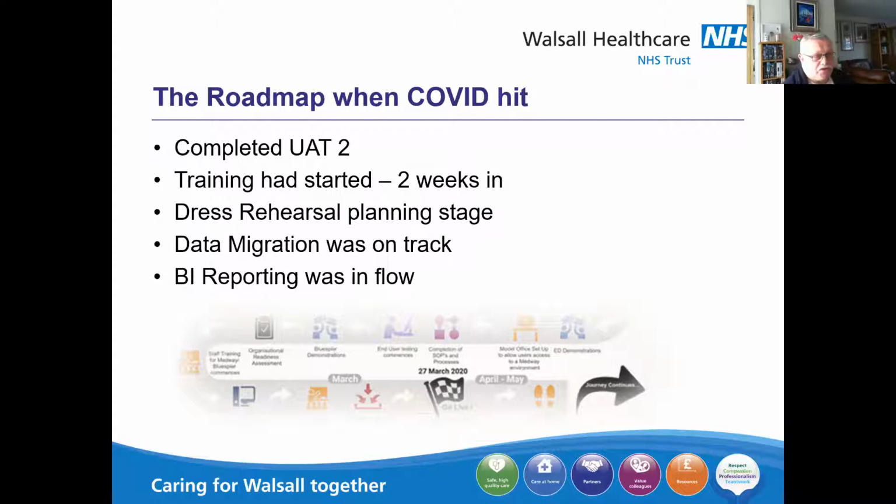Thank you, Keith. So as you saw on the previous slide, our original plan is just going up in flames. But where were we at that stage? We had just completed UAT2. We commenced training, we were 2 weeks in. We started on our dress rehearsal planning stage to get everything ready. Our data migration was on track, and our BI reporting was in flow. Now, as Barnsley had explained when they were going through it, everything completely changed. We did a complete stop of every single piece of work that we were doing on the EPR programme, and then moved on to COVID. And our training team and everything was then completely caught up with everything other than the EPR. So next slide, please.